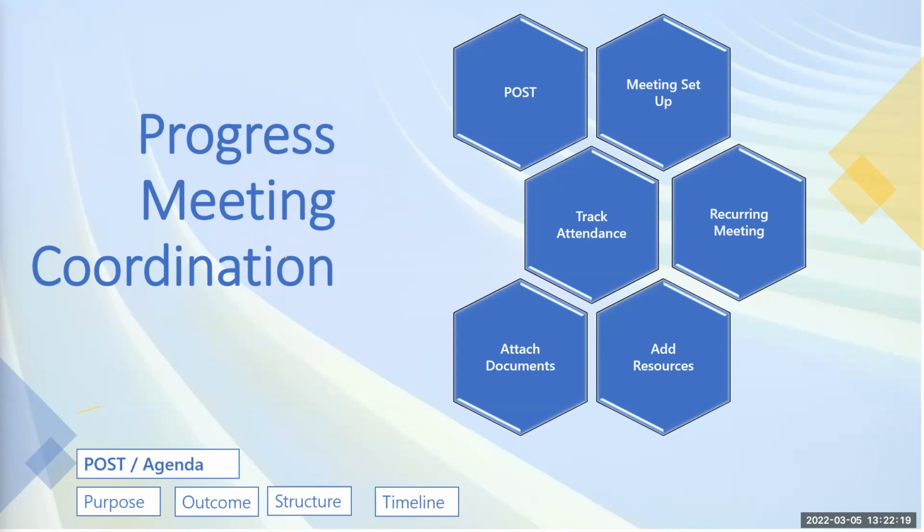I can dig that out while we're having the conversation, but it depends on the organization, right? Some people use Excel spreadsheets to track actions, so they have an action log, and they track who is the action owner, what this action is related to, the title, the description of the action, when the due date is, and what the comment is.